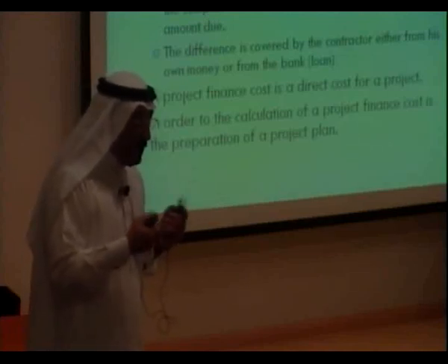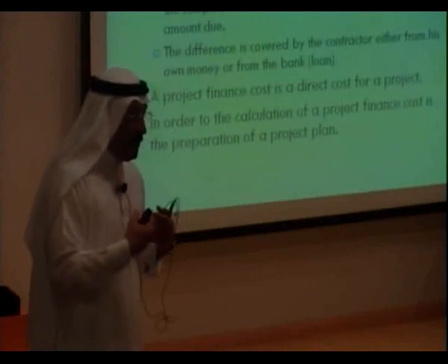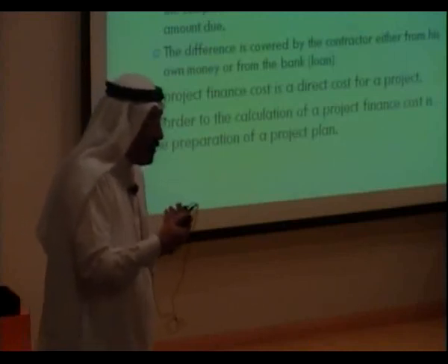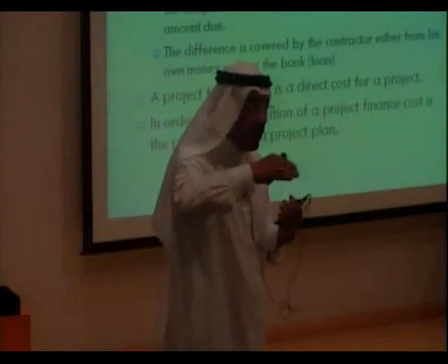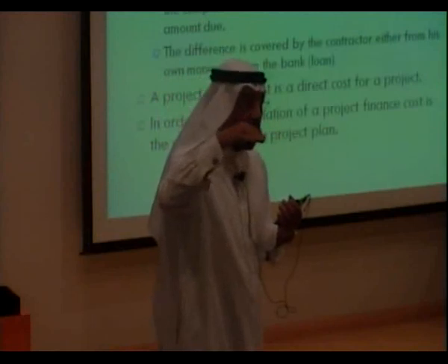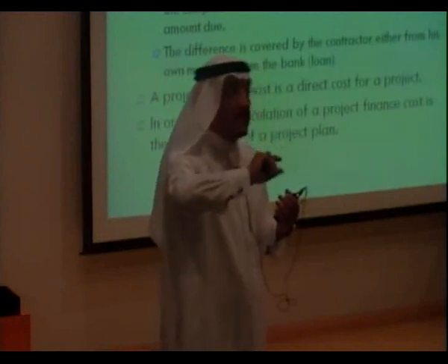Right? And this is where it's the contractor. I'm talking about the medium size, small contractors. If you want to do it, you have to look at the cash flow, how the cash flow is going to be over the life of the project, and see what is the overdraft, what is the amount of money